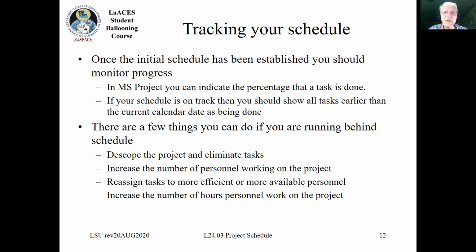And if you aren't, do something about it. Change how it is that you're working. Increase the number of personnel. Reassign tasks to more efficient personnel. Decrease the capability or the performance of your payload. Something. You need to do something in order to keep on that schedule.